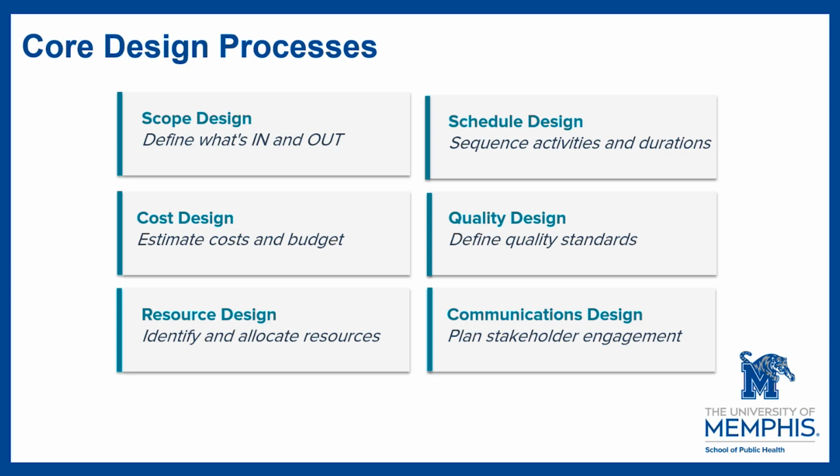In this phase, you cannot tell your stakeholder you can deliver a project in 3 months, fully knowing that there is a task within your project that will require you to at least put in a whole month of work. That's not feasible. So when you do your timeline, plan for incidents, plan for risks, plan for anything possible that can happen. Give yourself a generous timeline.